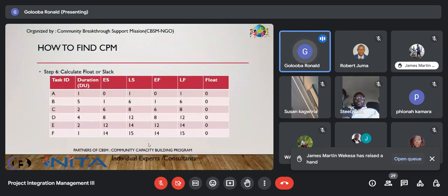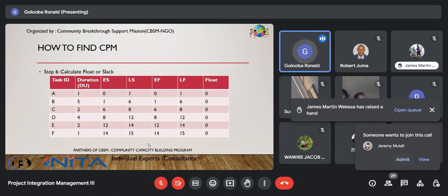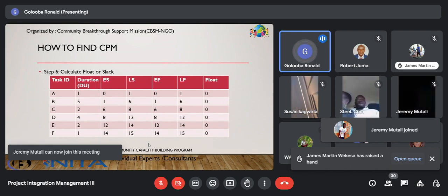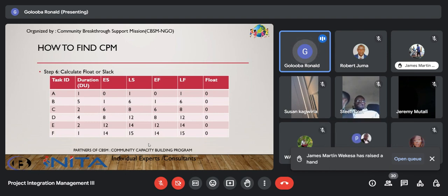And as a project manager, you should have a contingency plan in place to address any unforeseen events or delays that may occur during the project execution. So in summary, when the float is 0 for all project activities, it signals a tight and rigid schedule where any delays can directly impact the project's completion date, requiring careful monitoring and proactive management for you to ensure successful project delivery.